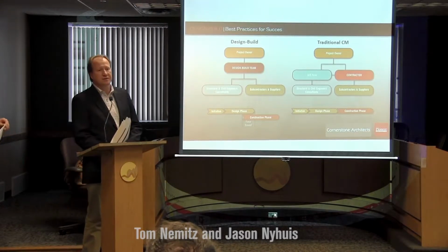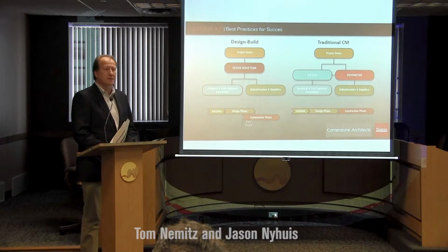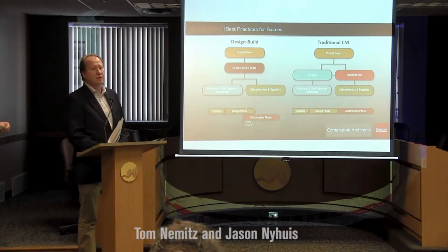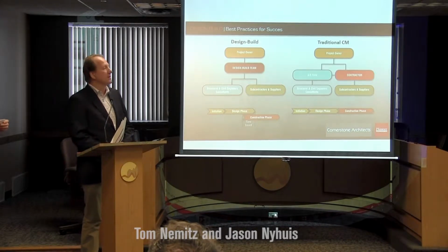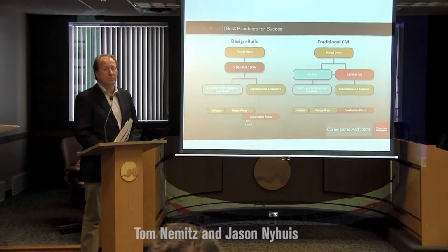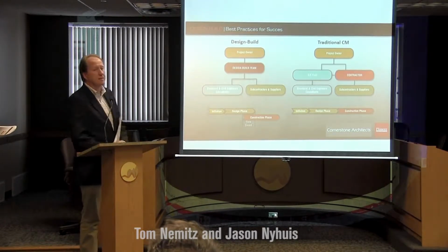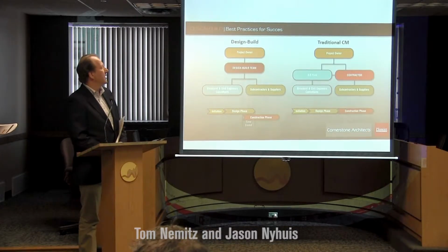In a traditional design bid build, typically the owner would hire the architect. The architect would utilize engineering consultants to develop construction documents. Those construction documents may either be given through a construction manager, a CM, or would be put out on the street for a bidding situation for everyone to review.